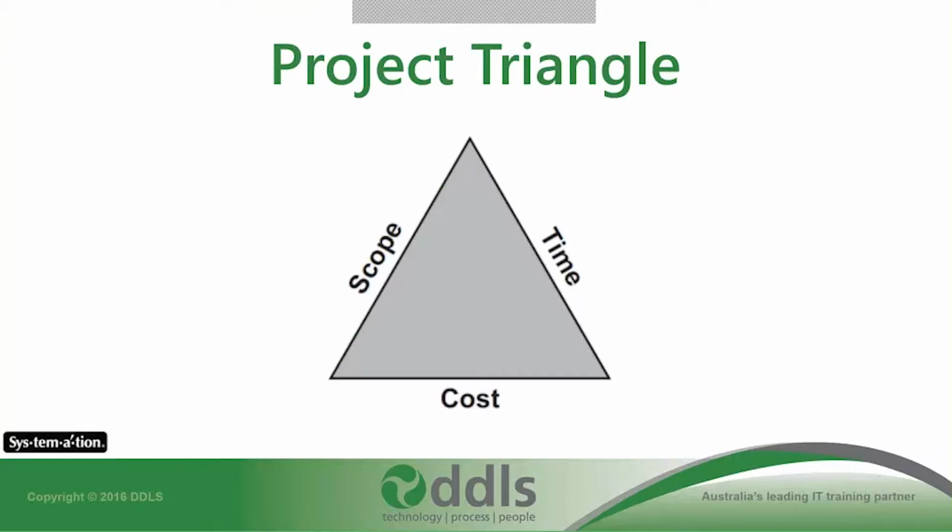You're always trying to look for a balance between those, and you're always trying to manage those. If you're looking at perspectives like Prince 2, where you actually have six different types of tolerances, on top of those you'll also have benefits, quality, and risks. Not to say that you don't do that as a project manager. As a minimum, you've always got your project triangle to consider: your scope, time, and cost. And if we were to expand out your tolerances into something like Prince 2, you've also got your risks, quality, and benefits to also manage.